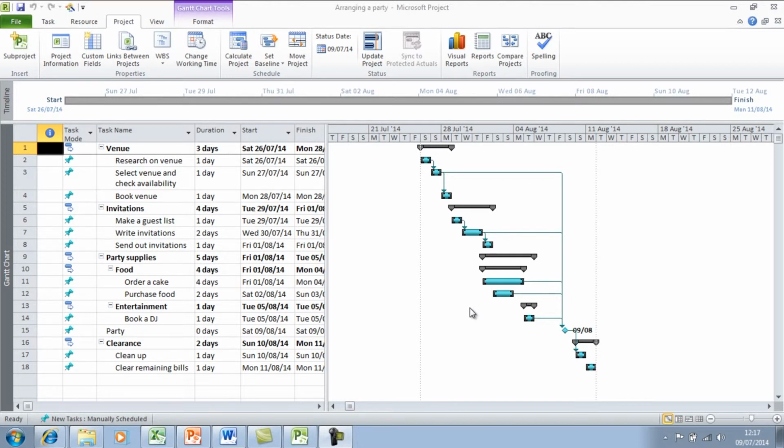as costs. But firstly, before you start creating actuals, you need to set the project status date, and this date determines when those changes will be effective. And if you don't set this status date, then Microsoft Project will automatically use the current date.